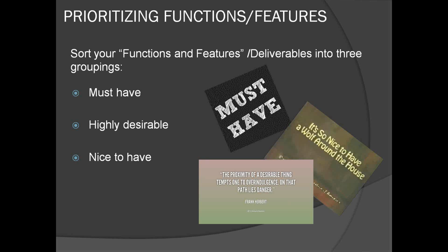So after you've decided you're going to go with the project, the second phase is you want to develop the plan. So you want to finalize the charter. By charter, what does that mean? There's a project charter that defines key stakeholders, deadlines, key activities, and if you want, you can literally Google project charter template, and there's tons of stuff out there for you, but you really do want to have some sort of charter that defines who's involved, when, roles and responsibilities, and different activities that you'll be dealing with, deadlines and those types of things, to make sure that you don't miss anything.